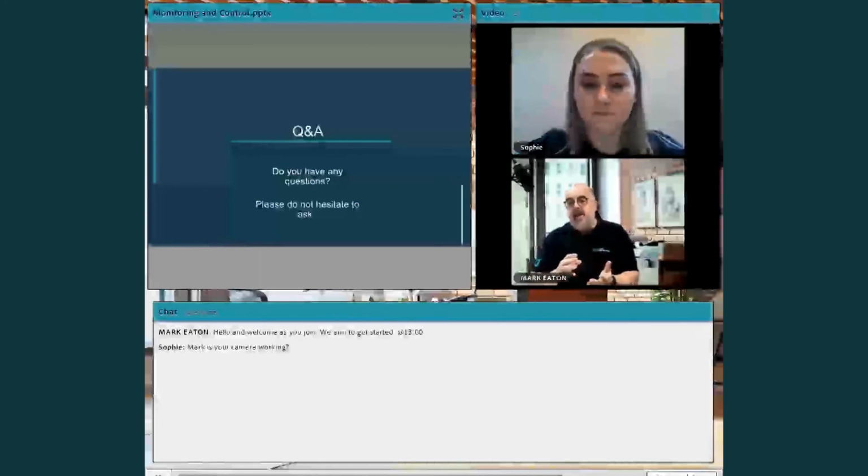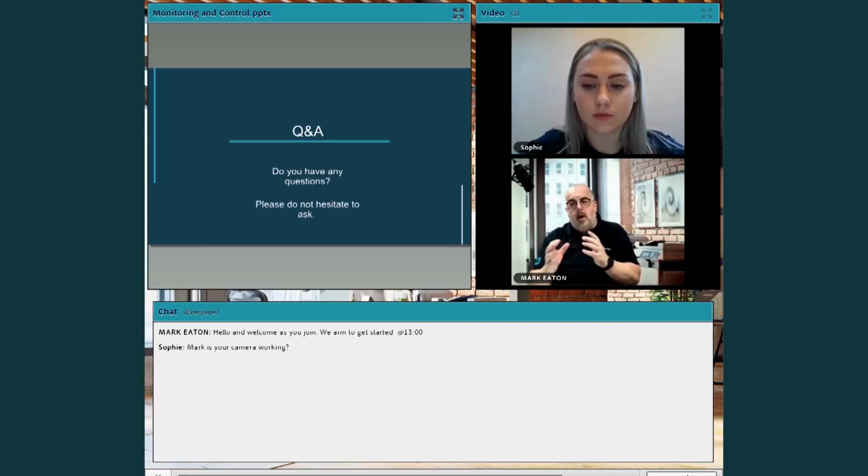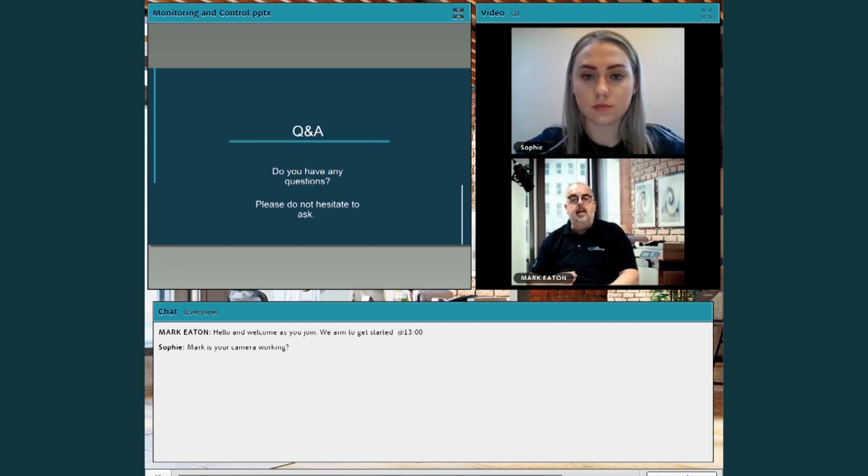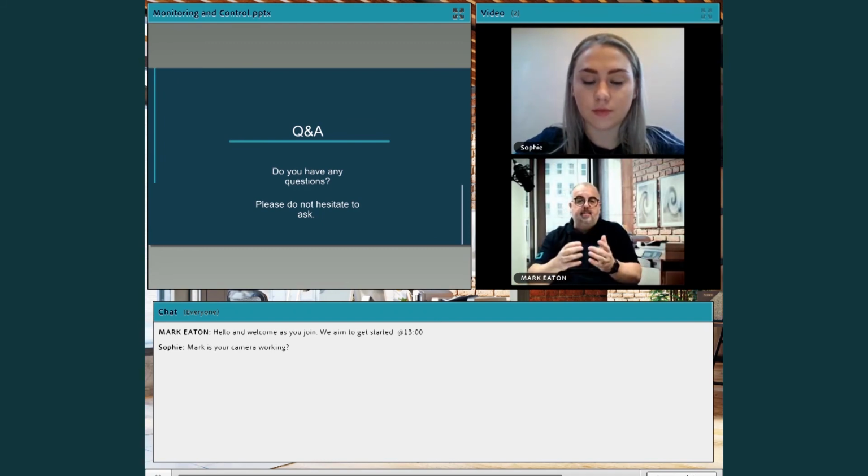So six things, and you can combine fixing some and flexing them. So time, cost, quality, scope, benefit, and risk. And you choose which. As an agile practitioner, I fix time and cost and quality, but I flex scope. I tend to fix benefits as well.